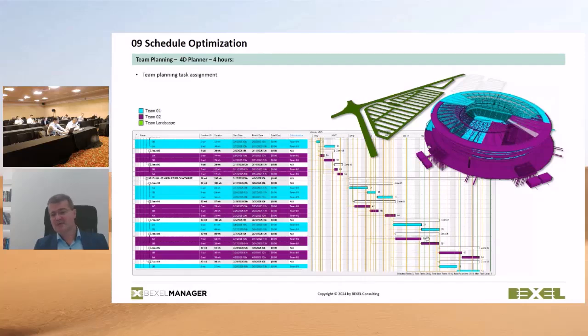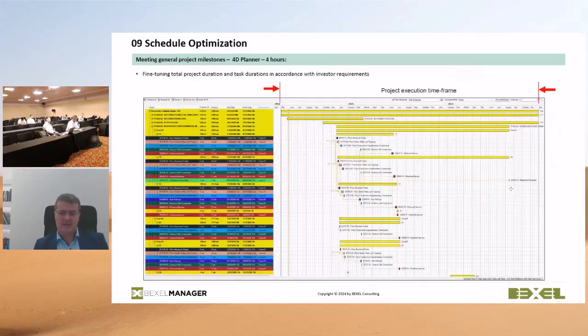All optimization of resources was done separately for contractor 1 and contractor 2, because you don't need to have only all the activities optimized, but each contractor or subcontractor needs to have optimized activities and quantities for them, because otherwise it simply won't work efficiently.